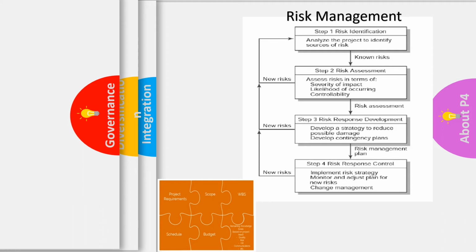But why wasn't this properly planned out and taken into consideration? If you know these are the materials that you want, have an excess stock or some type of system in place, a central stock, so that people can run out and give the appropriate stock to people, so that people are not stopping their work to go out and buy the materials that they need.